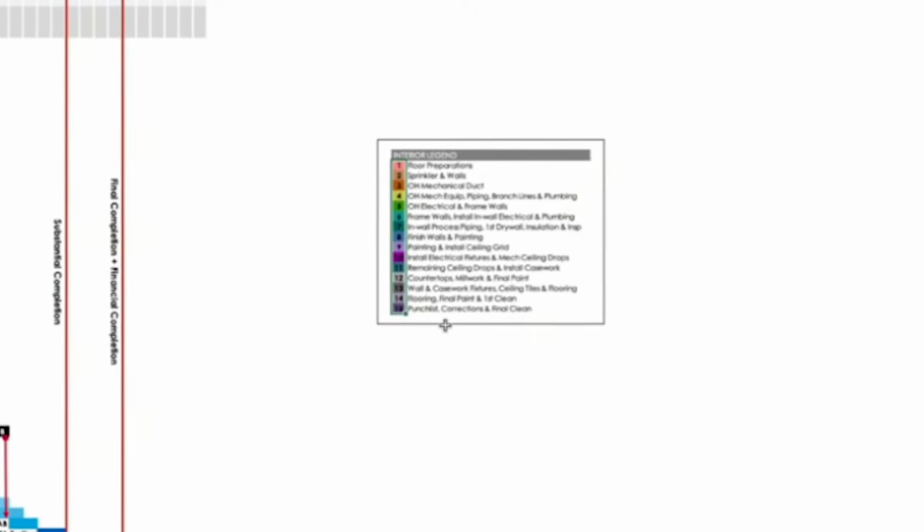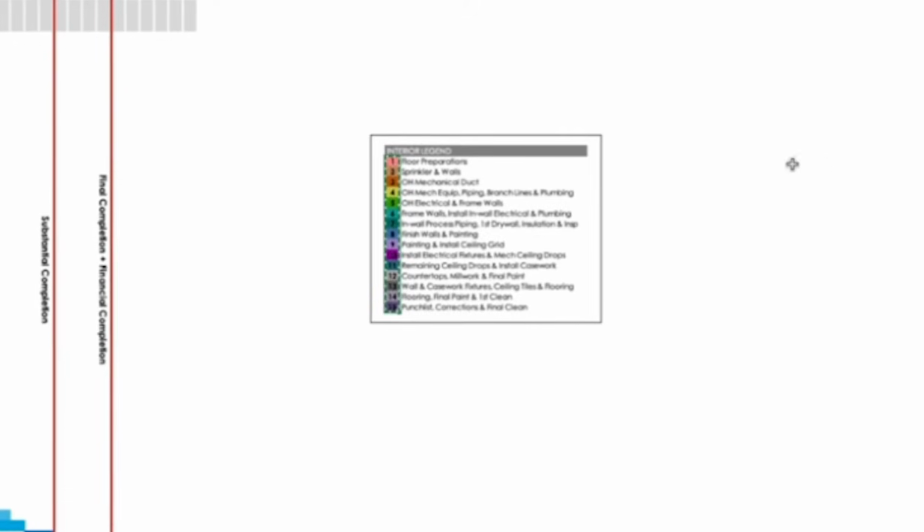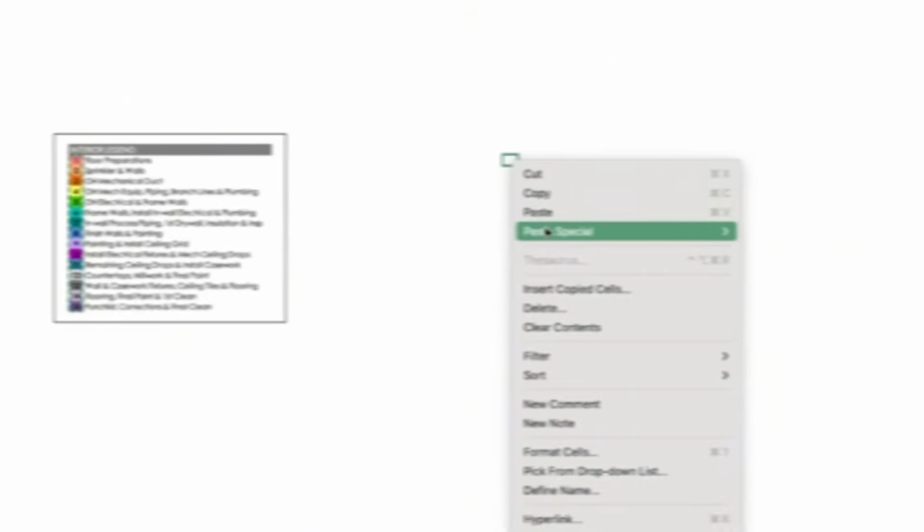And what you can do is you can simply, once you're done with all this, go down and highlight 1 through 15, hit Control-C for copy, and then when you come here to paste, you paste special, transpose, okay? Then you can hit Control-C copy, second zone, third zone, fourth zone, fifth zone, okay? And then you can start to see how the takt plan is created.